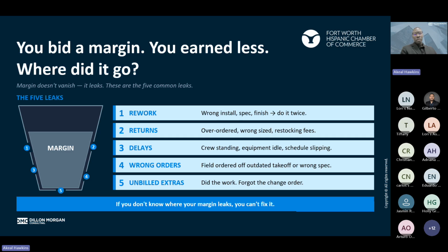And that's something I see a lot working with different businesses: the change order process. Whether it's a very solid change order process or maybe a little fluid, sometimes the work is moving forward without a change order and approval process, and the business owners get stuck on the back end where they've accomplished work that it's hard to bill for or get paid for. But these are different areas where margin leak could occur.